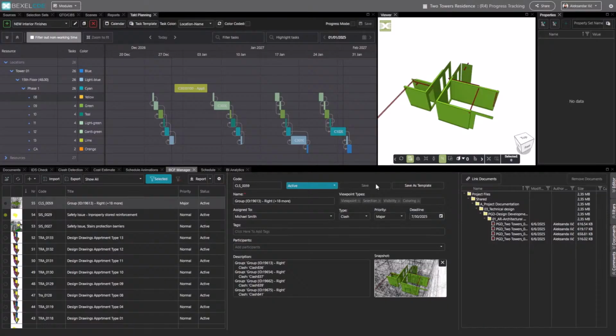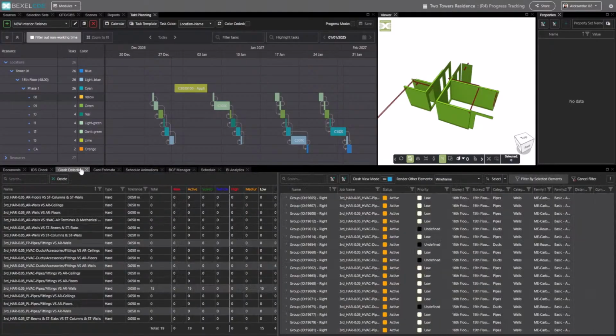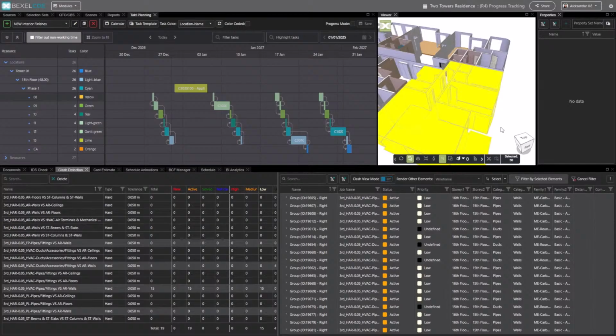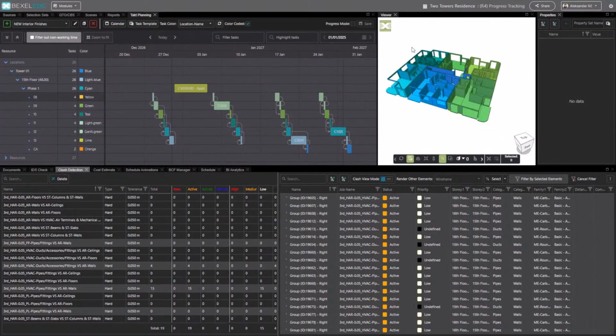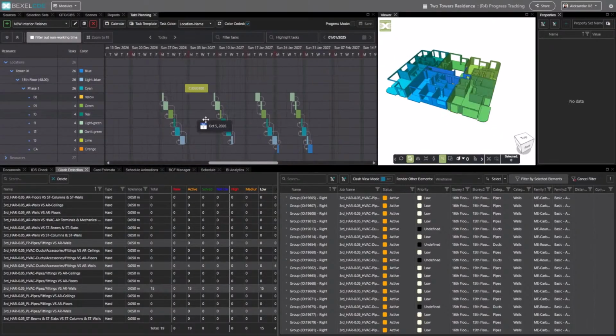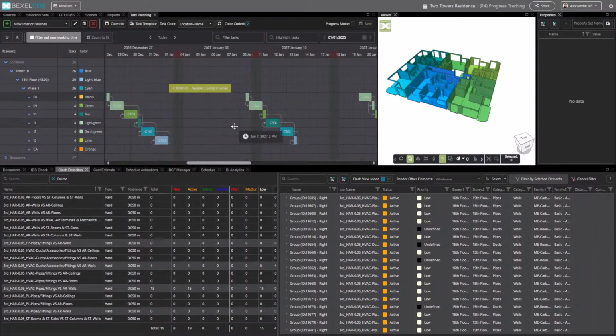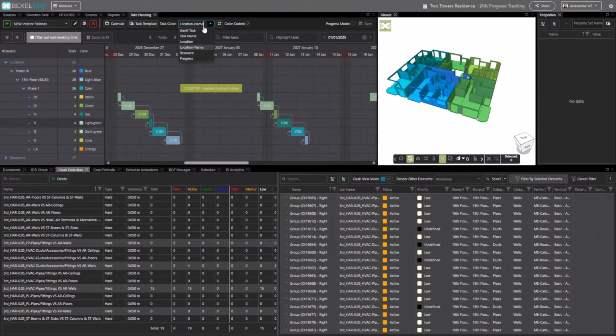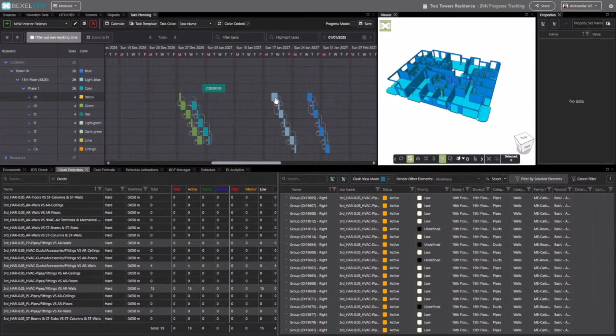Again, after this, in a typical workflow, of course, the next step would be also to simply, in takt planning, optimize and update this canvas. So let's say the group of subcontractors working on site would definitely go and simply reorganize this canvas in a way to make it more effective, to make it better coordinated. Since now we have, instead of one big floor, practically a task for every apartment, we can then overlap some activities in a much better way than in the master schedule.